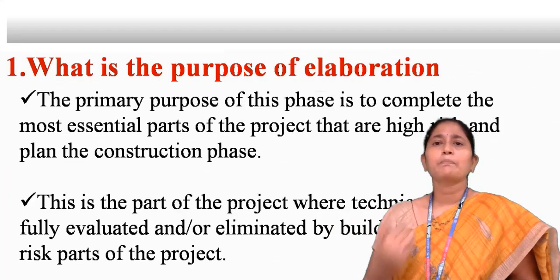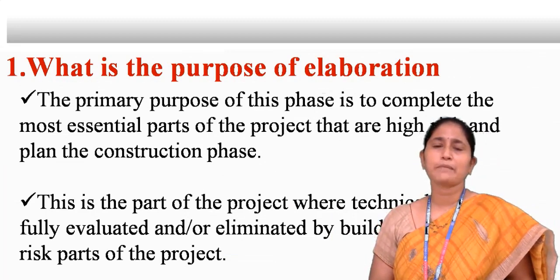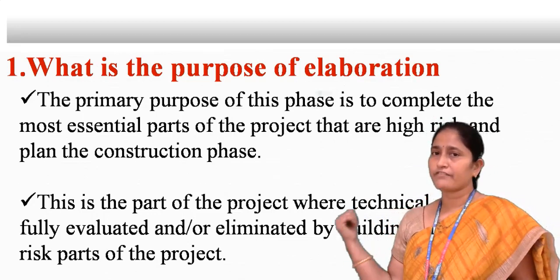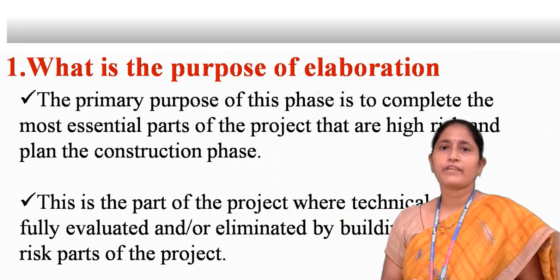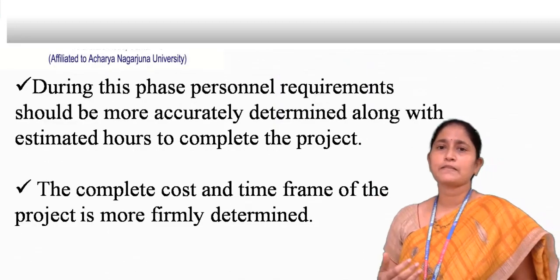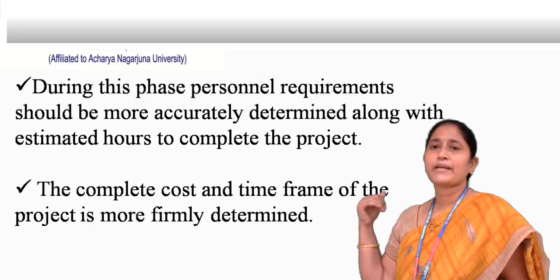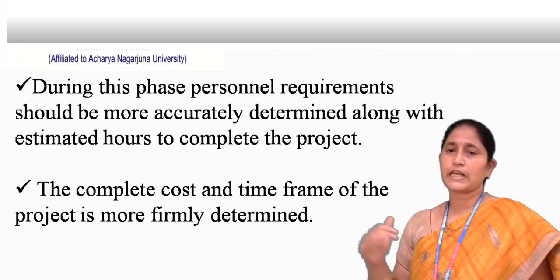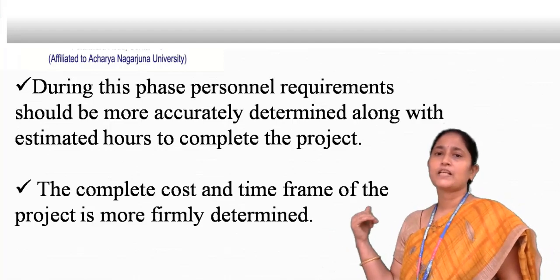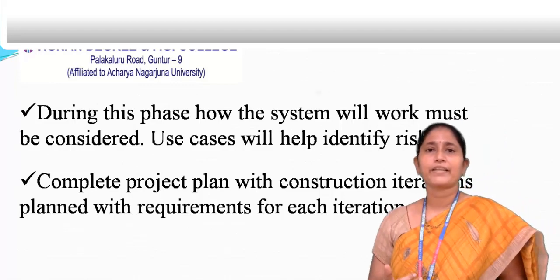The primary purpose of the elaboration phase is to complete the most essential parts of the project that are high risk and to plan the construction phase. This is the part of the project where technical risk is fully evaluated by building the highest risk elements. During this phase, personal requirements should be more accurately determined along with estimated hours to complete the project, and the complete cost and time frame of the project is more firmly determined. How the system will work must be considered; use cases will help to identify the risk.